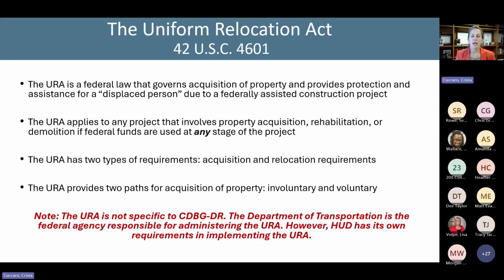If you're not familiar, the Uniform Relocation Act is a federal law that governs the acquisition of property in a federally assisted construction project and provides protection and assistance to displaced people due to a federally assisted construction project. It also applies to federal projects, but obviously our scope here is federally assisted construction projects.